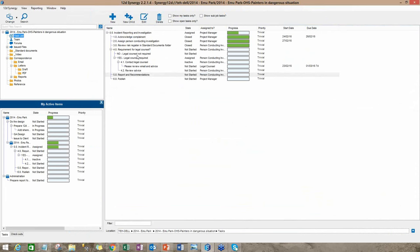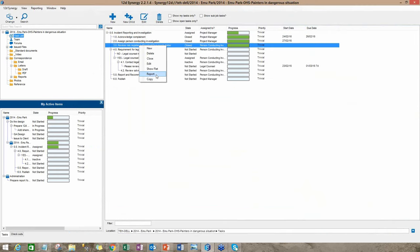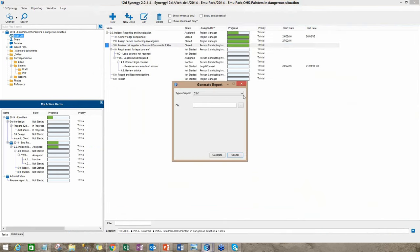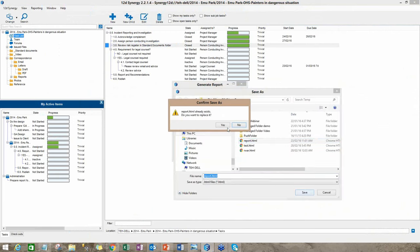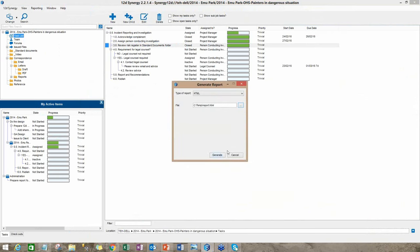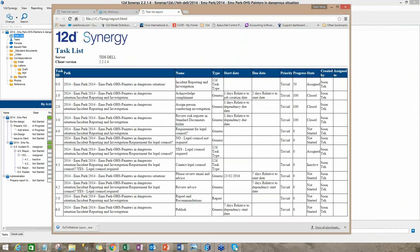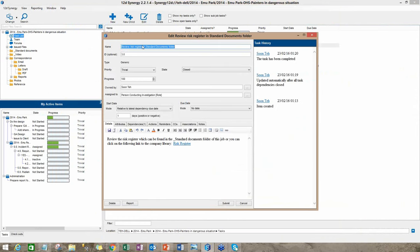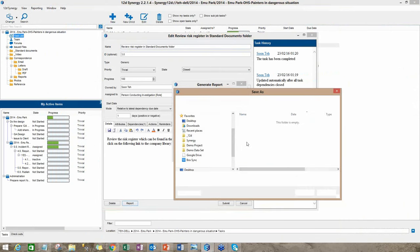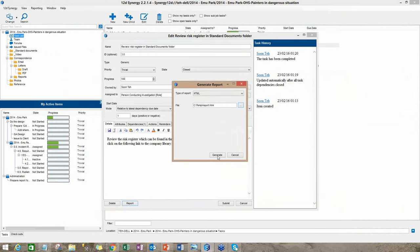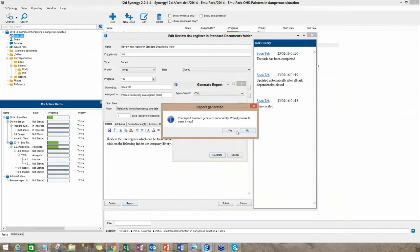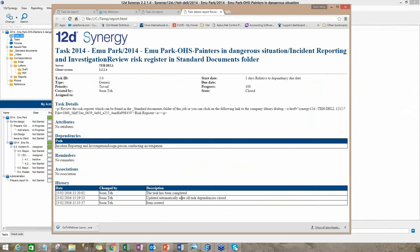The next thing I want to show you is reports. It is important to be able to create reports as I mentioned earlier. To do that I right click on any task and there's an option here called report. Reports can be outputted in CSV, HTML or XML format. In this case I'm going to choose HTML. I'm going to give it a name, report HTML, generate the report, open it up and here it is. So this is a report on all tasks related to this job. Now this is fully customizable. You can customize your own template and generate reports the way you want it. If I want to have a report on the specific task I can open up the task and click on report. As before I'm going to create an HTML report, generate and open it up. And there it is. That's the report for that specific task.